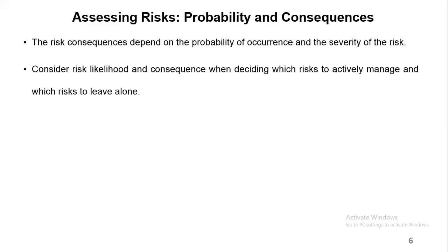So you want to know, can we perhaps just accept this risk, or perhaps we need to draw up an action plan, or perhaps we need to put up some sort of engineering controls in place, or we need to just use PPE, or that risk we can actually just accept it and ignore it, and then maybe just monitor it from a distance. So it helps you with that. So with this, you need to know the likelihood and the consequences or the impact for managing it.